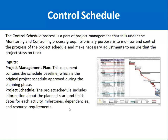The first input for the Control Schedule process is the Project Management Plan, which is a collection of different documents such as the scope management plan and communication management plan. One key component is the schedule baseline — the approved schedule from the planning phase. For example, management approved the project must be completed within four months, starting January and finishing by end of April. The schedule baseline is used to measure schedule performance.